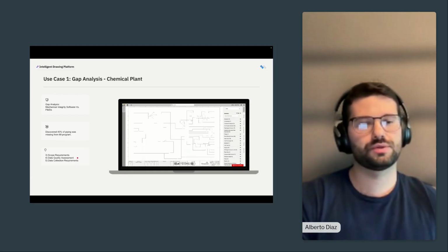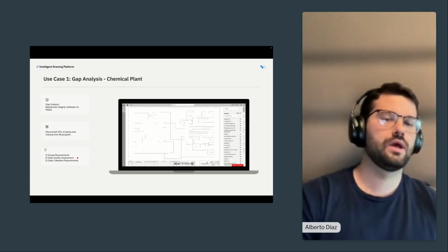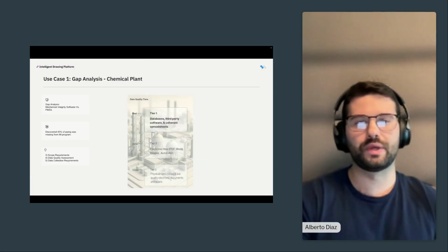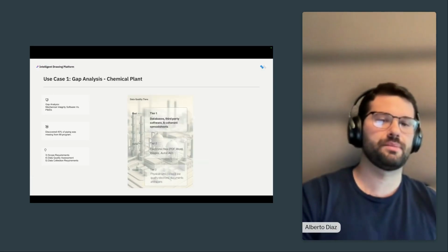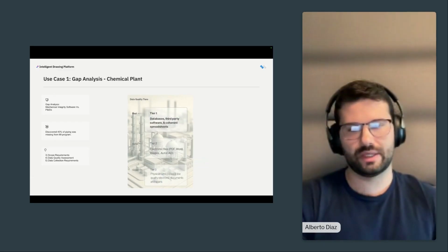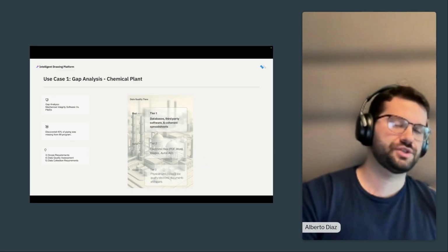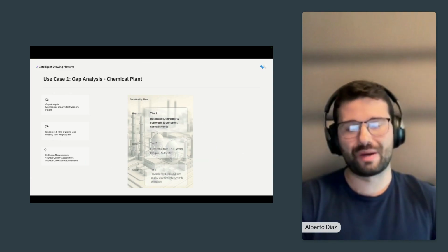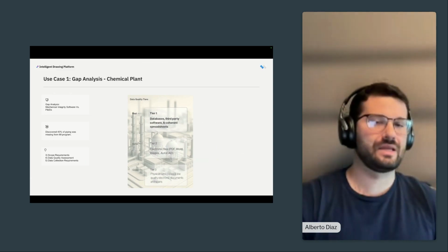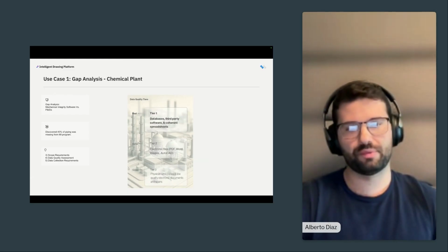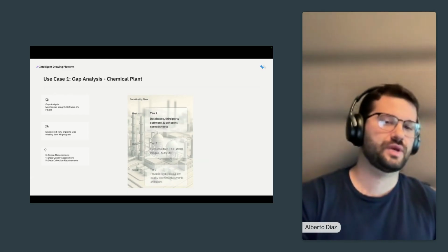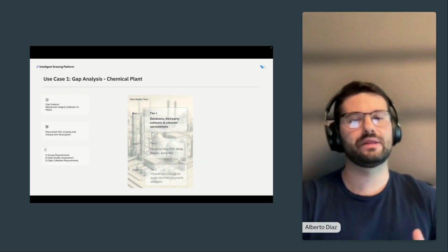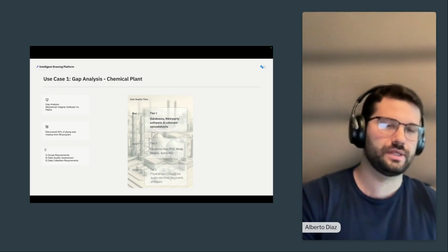In line with that, it also talks to the data quality of the actual documentation that we're looking at. Within the white paper, we go into a little more detail on this, but depending on how legible, say, P&IDs are and the other sources of information, the amount of effort it might take to do a mechanical integrity program implementation may vary significantly. In our approach, we prefer to work with CAD files for the data extraction, as we have seen that it yields the best results when we're generating the inventories from within the P&IDs.